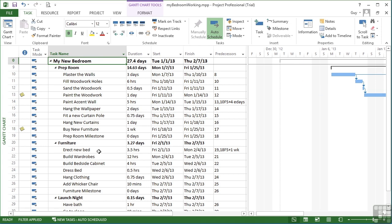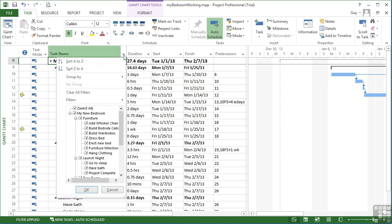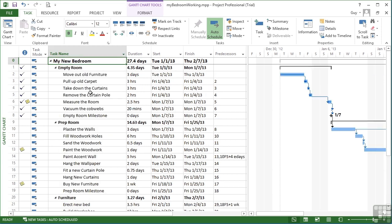You know that there are tasks missing and a filter is applied because down in the status bar it says filter applied and in the task IDs there are numbers missing. In this case all the ones that have been completed are missing from our list. We can always return it by going clear all filters.